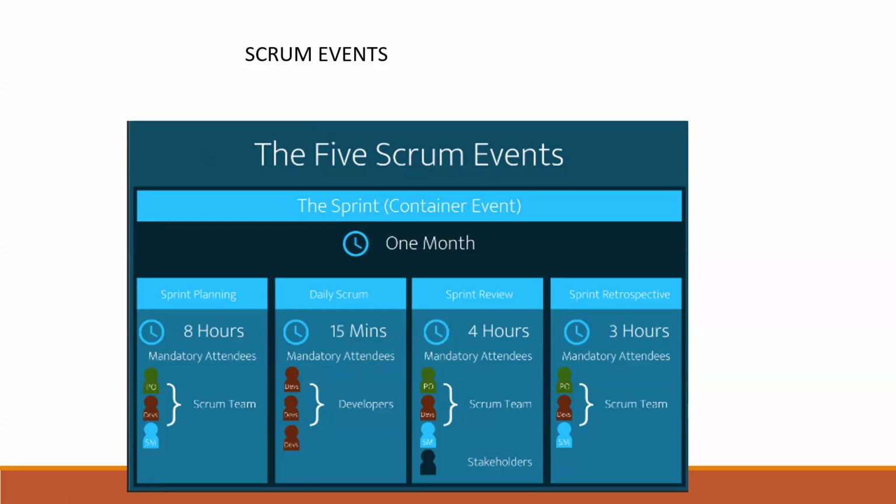If one guy is taking 20 to 30 minutes and there is a team of 10 to 15 people, and one guy is taking a lot of time, it's your job to stop him and say, man, let everyone get the opportunity, and your time is only for 1 to 2 minutes, nothing more than that. You are working on one task and you should give the status on that. That's it, nothing more. If there is any issue, yes, we can take the call later.